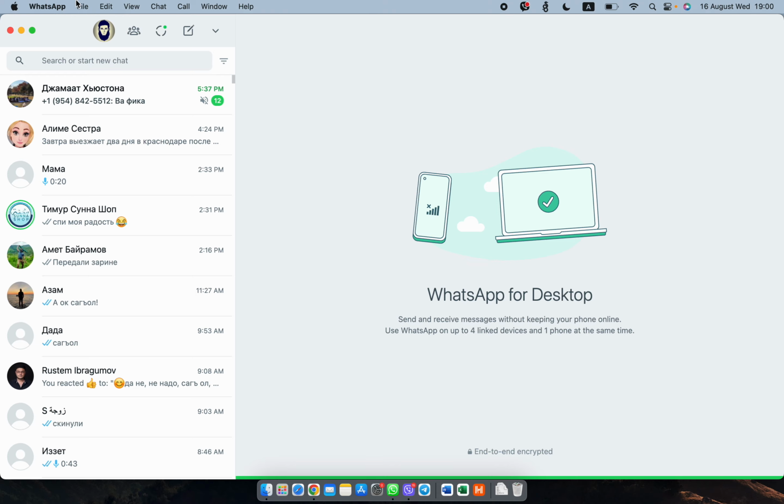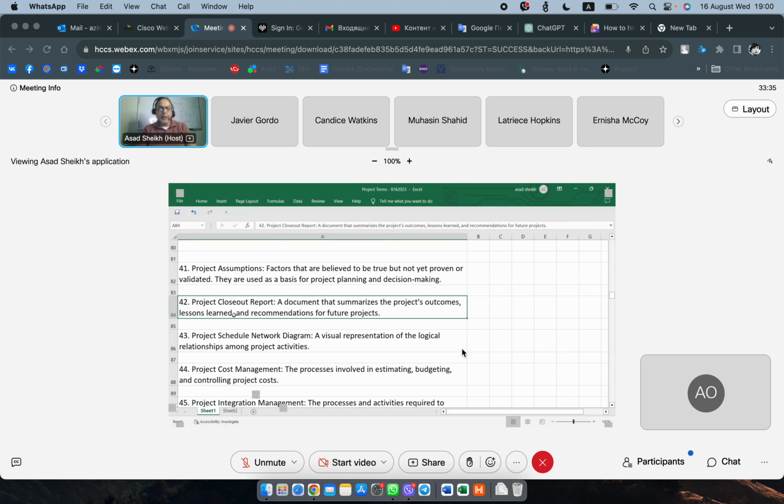Project closeout report. We're going to create one. Once we close out the project, we're going to have a closeout report in which we're going to summarize our outcome. Did we produce a product, a service, or a result? And we could include in there your lessons learned and any recommendations. This closeout report is created after you complete a project. Sometimes when you create this report, you have to present it to your stakeholders. It's just a summary of what we have accomplished, so you can close out formally. It's like a formal process.